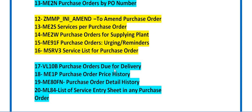VL10B is for purchase orders due for delivery. For example, if you ordered 100 quantity of some materials and the vendor has supplied 90, with 10 quantity still open for delivery, you can get the data of purchase orders due for delivery using transaction code VL10B.